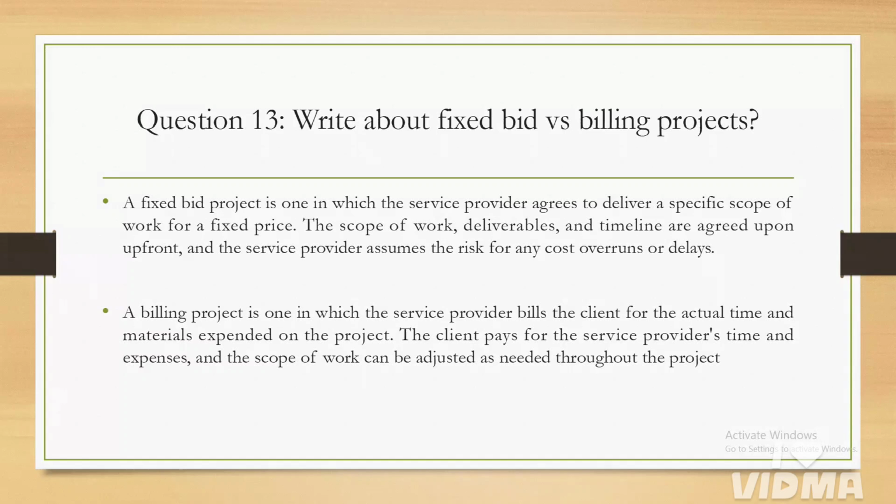Here the risk is more for the client, because if he plans to complete the project within 18 months and the resources do not work in a good way, then the budget will increase and the timeline will also increase. That is the reason the client has more risk here. In the other model, the vendor, the Adino company, will have more risk.